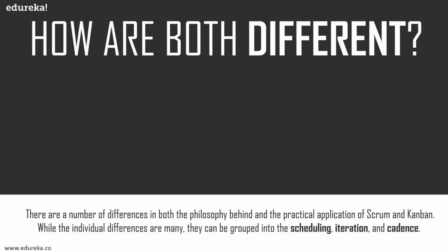Now, Scrum processes place heavy emphasis on schedule. The Scrum team is provided with a prioritized list of story points that need to be completed to deliver a shippable product. The team must decide how many of the points they feel can be completed within one sprint, and anything outside the scope they commit to must wait for the next sprint. Optimally, an efficient Scrum team will quickly learn their capabilities over the course of several sprints, and the estimates improve and are optimized as time goes on.